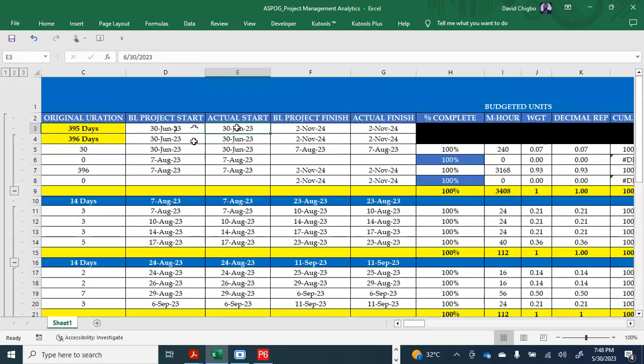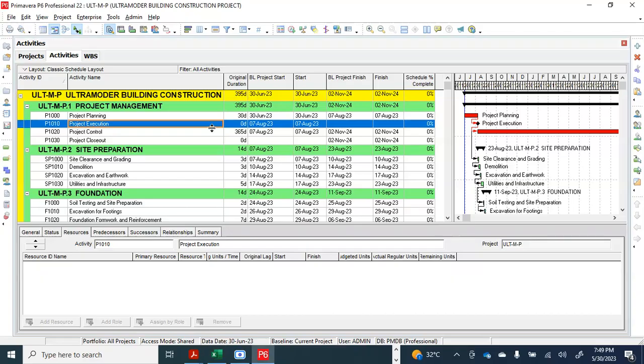Even though you say go ahead, you can start, but don't change that particular date. Just leave it in this format, because the people on site, you are giving them this program of work for them to see the dates. The reason why you're giving it to them is for them to look at the dates when they are to finish. If they didn't finish by that time, that means they will lag behind time. Do you understand? So long as the project start has already been initiated, they need to consider when they're supposed to start so that they'll be able to meet up to time. I don't know if you understand.